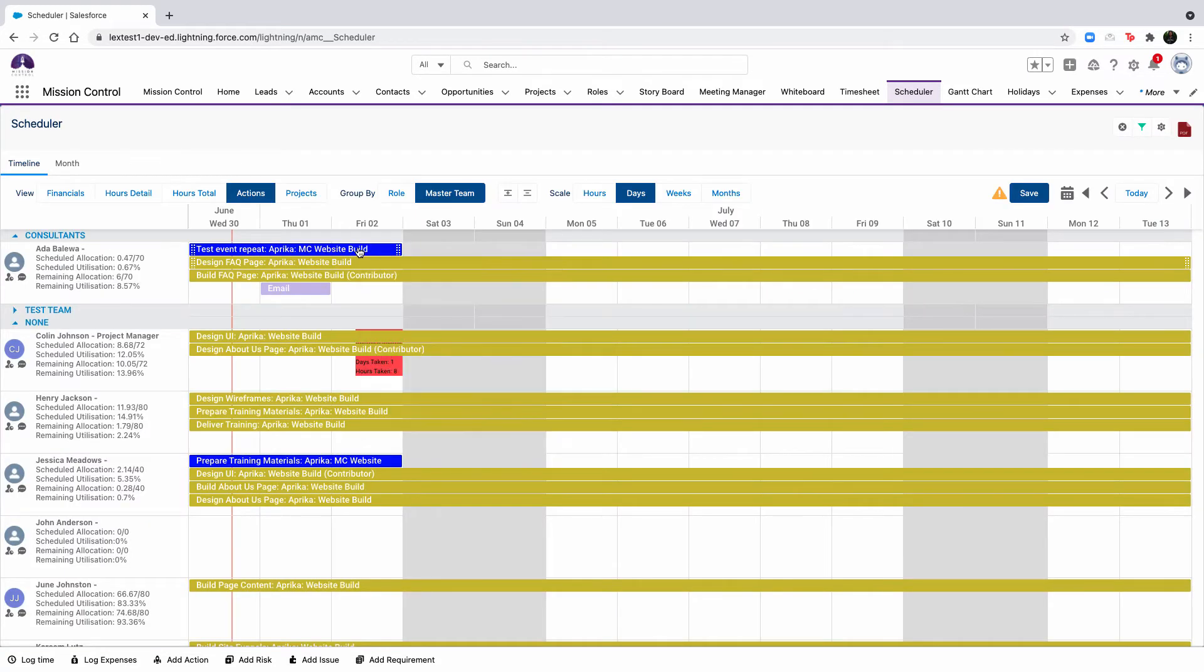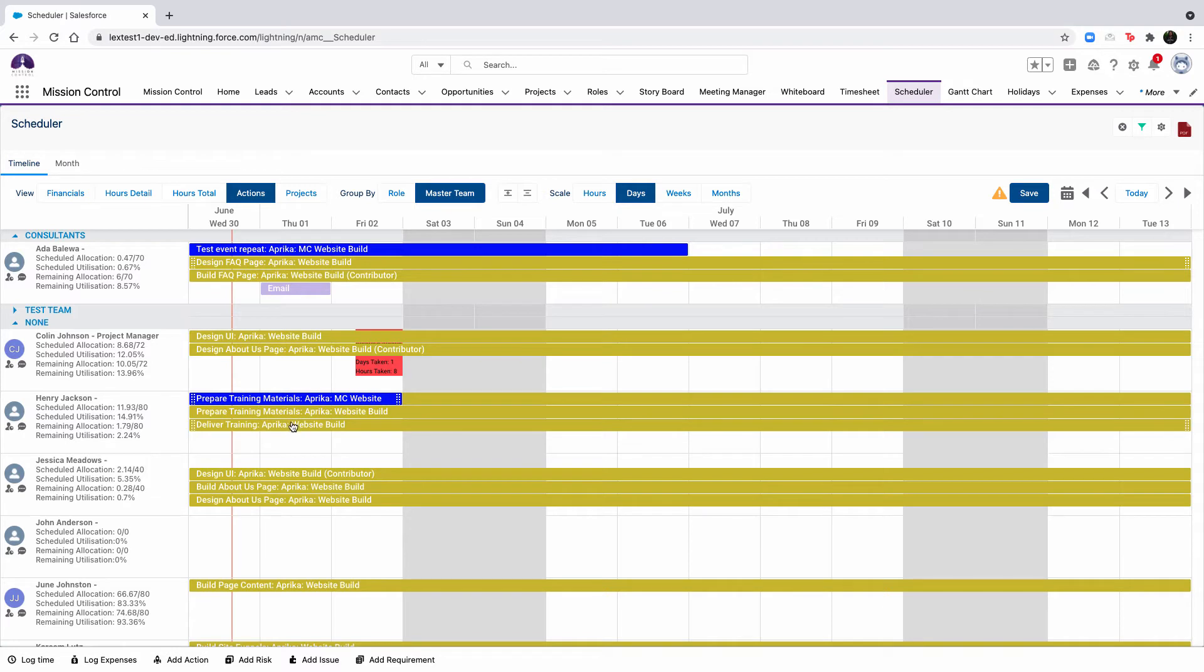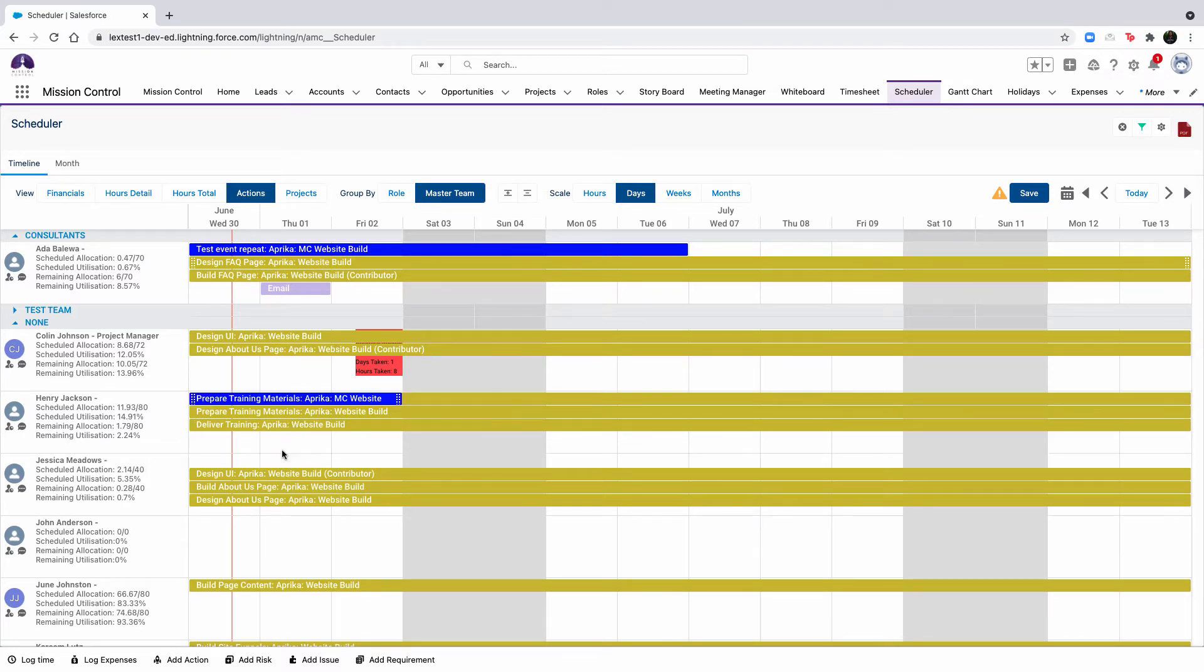To reassign actions, drag an action from one role to another. This also works for reassigning a contributor to an action.